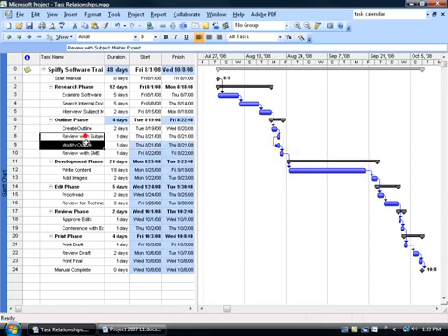Now let's see if this makes sense. We're looking at these two. So these two are going to both start at the same time. Again, does it make sense? When I'm reviewing the outline that we created above with the subject matter expert, he's going to suggest changes and therefore I'm going to modify it. So basically, I've got a meeting that's going to start at, let's say, 8 o'clock to review the outline with the SME. At the same time I'm reviewing it, I can start modifying the outline as he's sitting there talking and going over the outline with me. I can go through with red pen. So yes, basically I can start modifying at the same time I'm reviewing the basic outline as we created above with the subject matter expert.